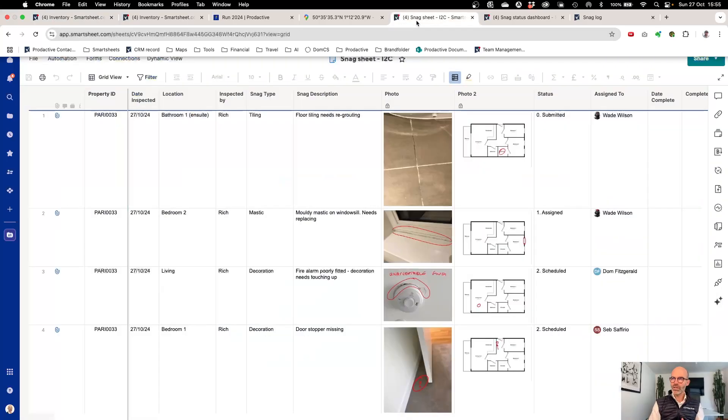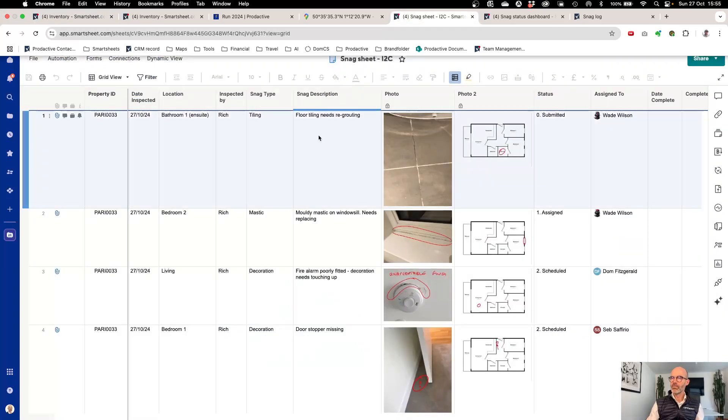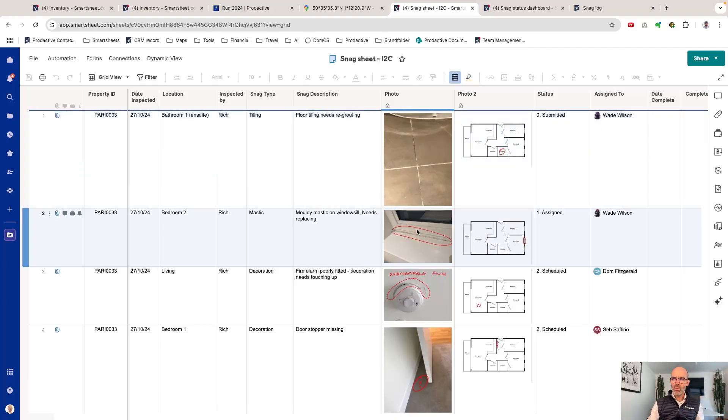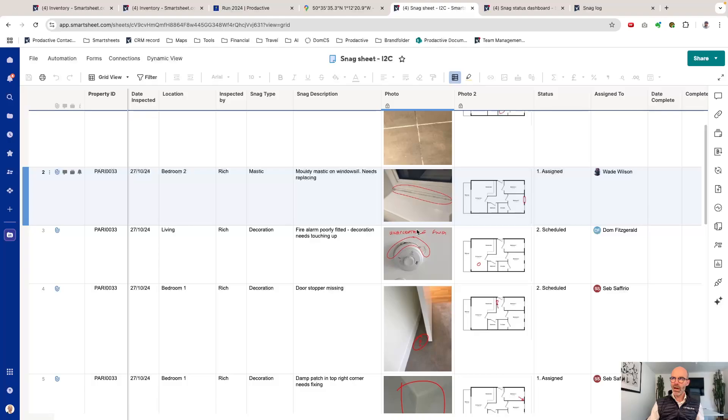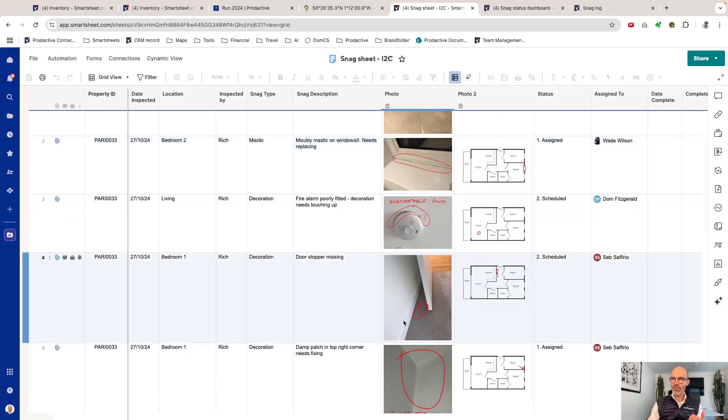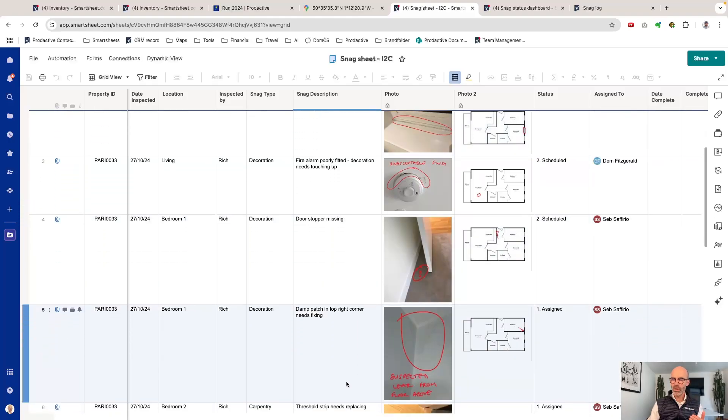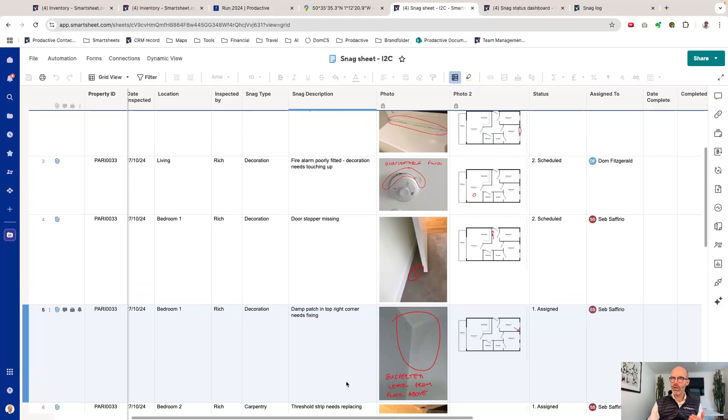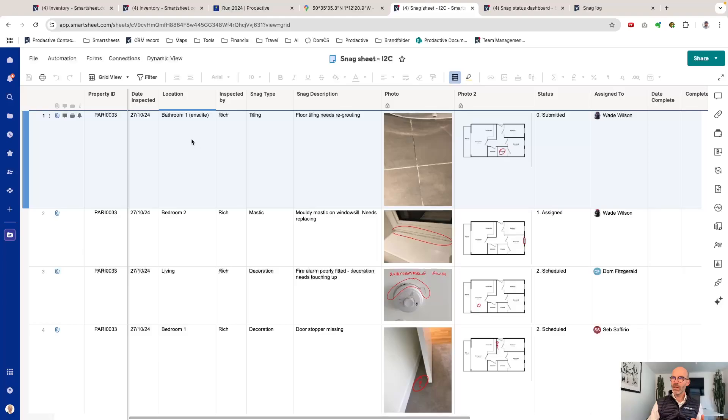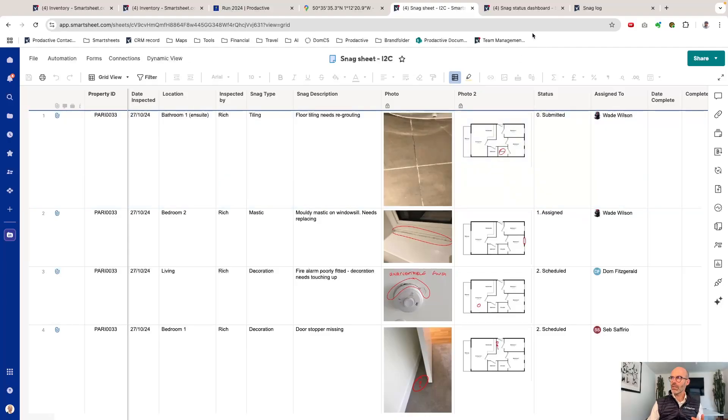A real-life example here is when it comes to properties and reviewing properties. You either have a punch list or a snag list of items. When I was reviewing properties, I would go around and anything that I didn't feel was good enough to accept, I would inspect it, flag the item, and say what I wanted fixing and let the team know where that problem was.